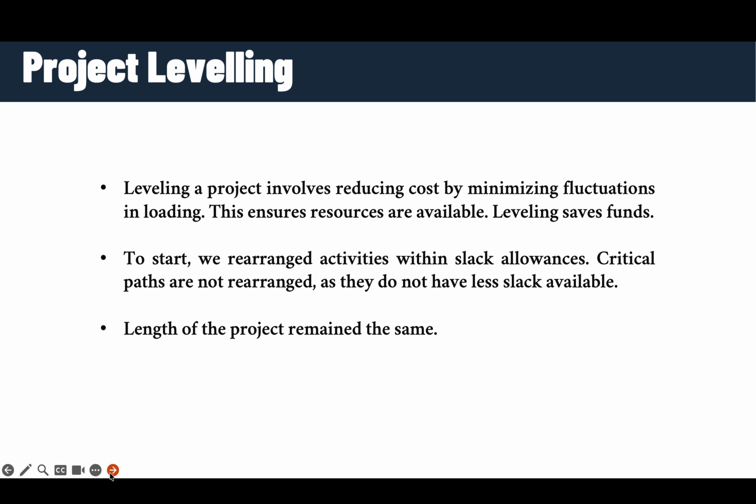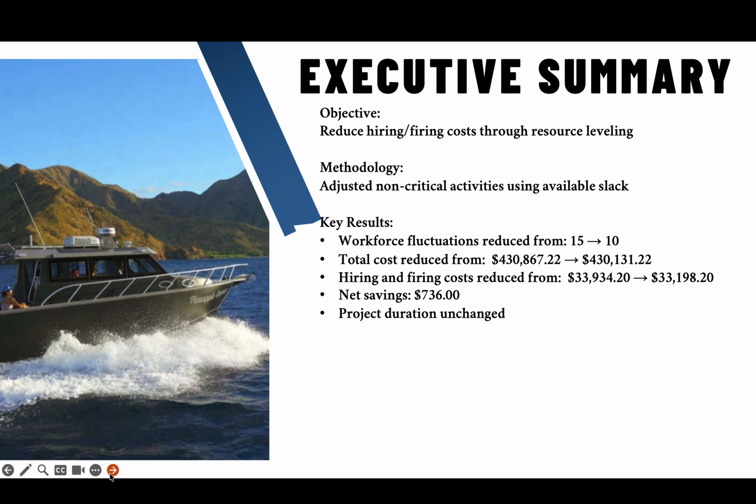To begin, I'll briefly explain the concept of project leveling. Resource leveling is a technique used to minimize variations in resource demand over time. In many real-world projects, resource usage tends to fluctuate significantly, leading to inefficiencies such as frequent hiring and firing, idle labor, and increased operational cost. The goal of leveling is to smooth out these fluctuations without altering the project's total duration.